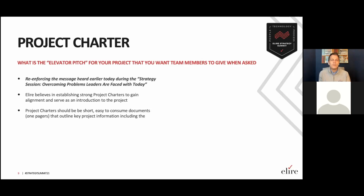And remember, those people can be team members, they could be project sponsors or executives, but it's important to make sure that everyone is staying on the same page, communicating the same message. And as mentioned earlier, project charters should be short and easy to consume. We do not believe in project charters that are 40, 50, 60 pages long that tend to gather dust and sort of sit on a shelf. The goal is really to have short project charters. We like to have 1 page front and back, and they should really outline all of the key information on a project. For example,